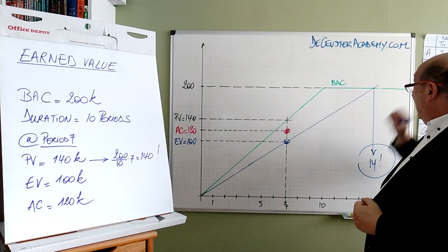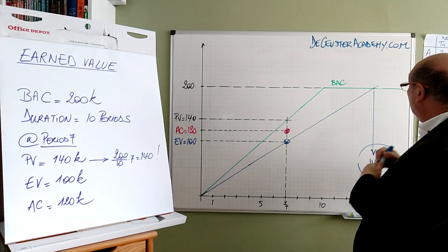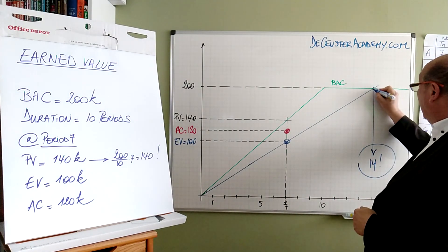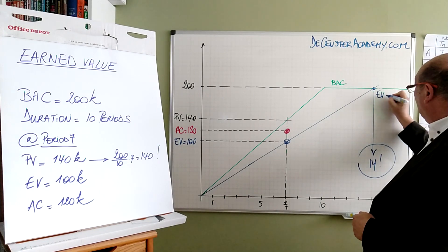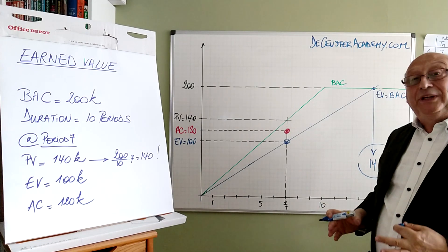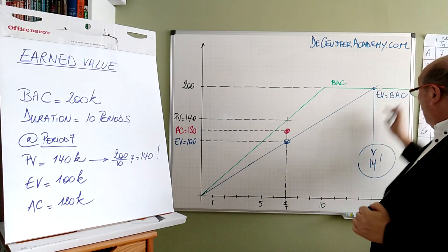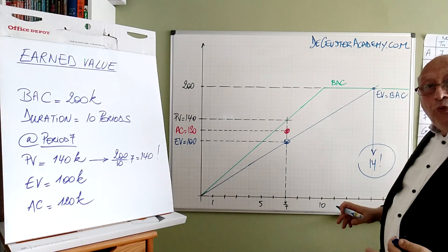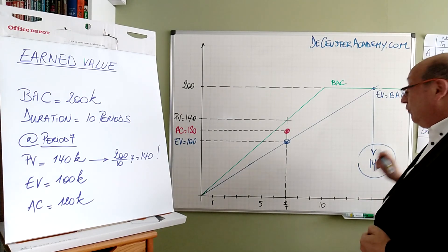Basically, when I create an earned value which is equal to the BAC, EV is equal to the BAC, it means that all the work has been completed. Now we want to know how many weeks, what are the periods. I look here at 14.